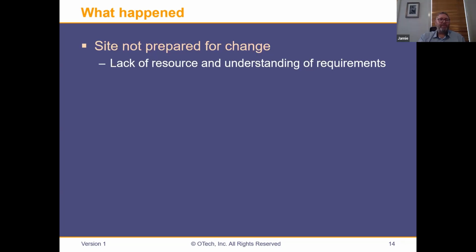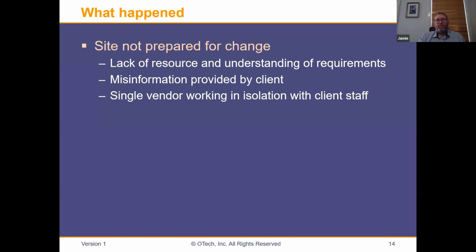They had a lack of understanding of what was coming, why it was coming, how it was coming. There was misinformation provided by the client in regards to their readiness. Basically, it was a radiologist who said, this is what we're doing, but hadn't informed any of his staff. There was a single vendor working in isolation, which was the new RIS vendor, and they had been engaged with the clinical staff before I had arrived as a project manager. And they had partially built the solution into the test environment.